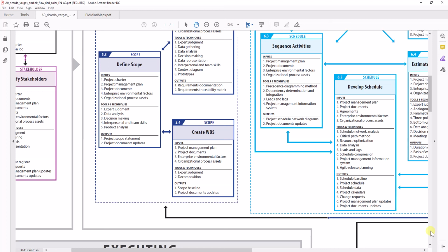In brainstorming, you don't judge, you don't comment or categorize ideas, you don't ask questions unless they are towards generating more ideas. You are not going to ask critical questions about why you think this is an idea, or this is a requirement, for example. Brainstorming is one data gathering technique.